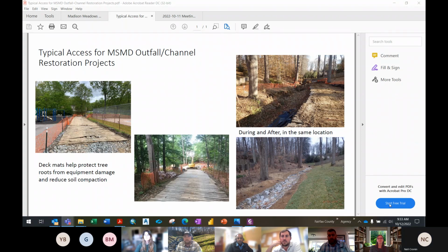Yeah, these trucks have the right amount of axles, so they're not displacing too much weight per square foot. They are on-road rubber tired vehicles, so I don't anticipate an issue with that. But during the pre-construction meeting, whether it's a video or taking pictures of all access points, we'll make sure anything that's damaged is definitely fixed. Yeah, we'll need to document the existing asphalt condition really well, Rachel. And then if there's obvious damage, rectify that on our end as part of the project. Yeah, okay, that's very helpful.